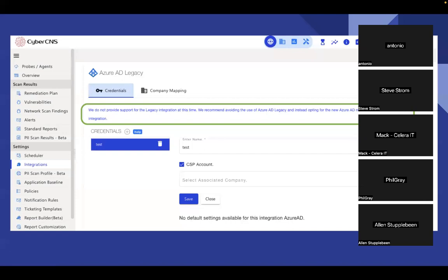But what we're going to be doing right now is that only critical bug fixes, which are basically SEV 1, 2, 3 bug fixes, which essentially are required on the current platform, will be taken up. All of the requirements which come in either as SEV 4 or enhancements, minor tweaks, etc., will be moved into V4, and we will be taking care of those in the V4 instance.